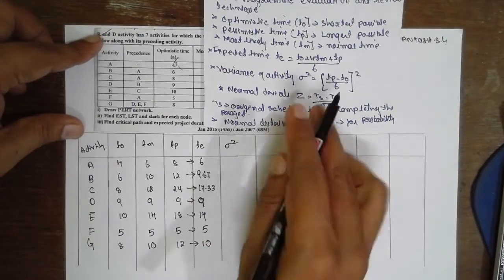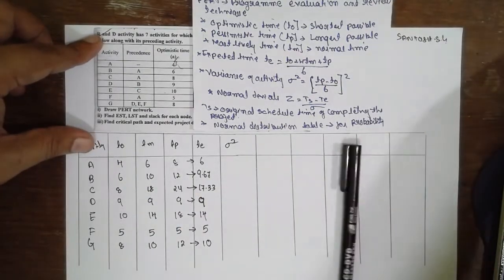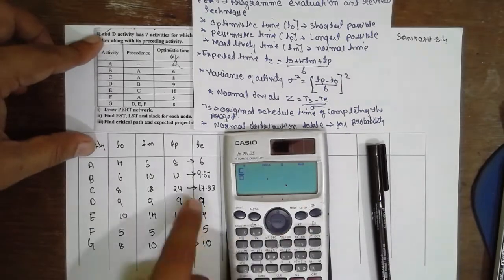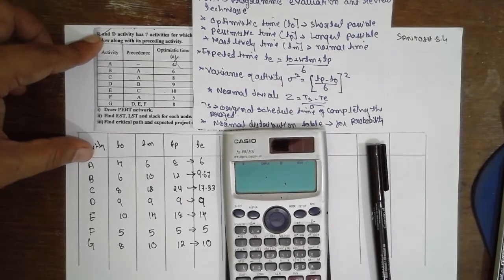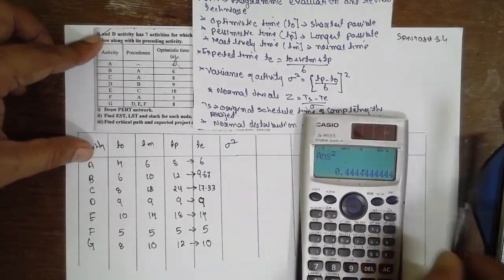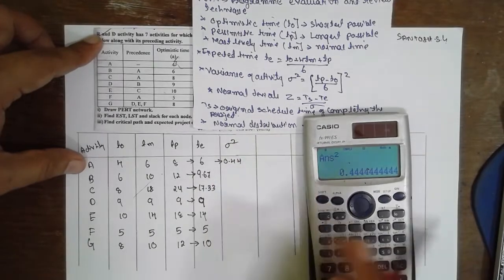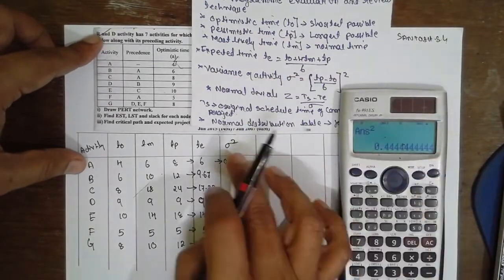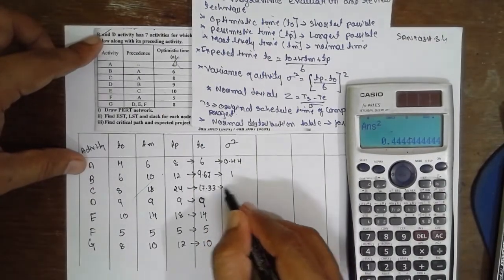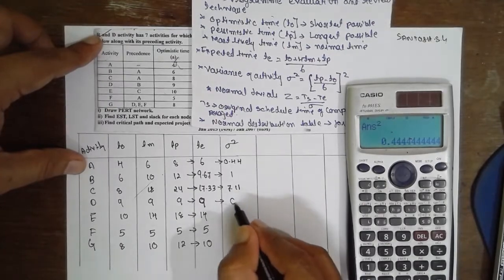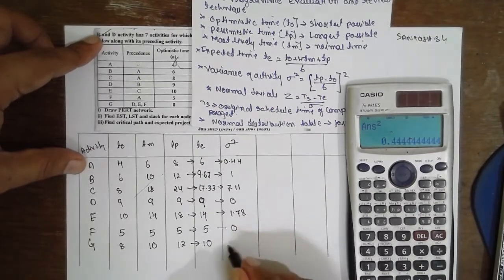Now for sigma-square, the formula is: σ² = ((Tp − To)/6)². For A: (8−4)/6 squared = 0.44. Do not transfer the square — we require the squared value. Following the same procedure: A=0.44, B=1, C=7.11, D=0, E=1.78, F=0, G=0.44.